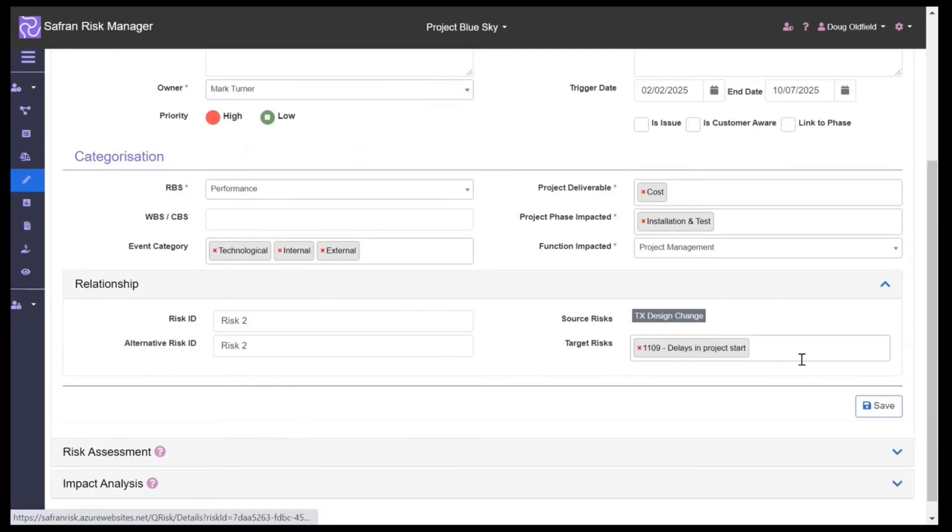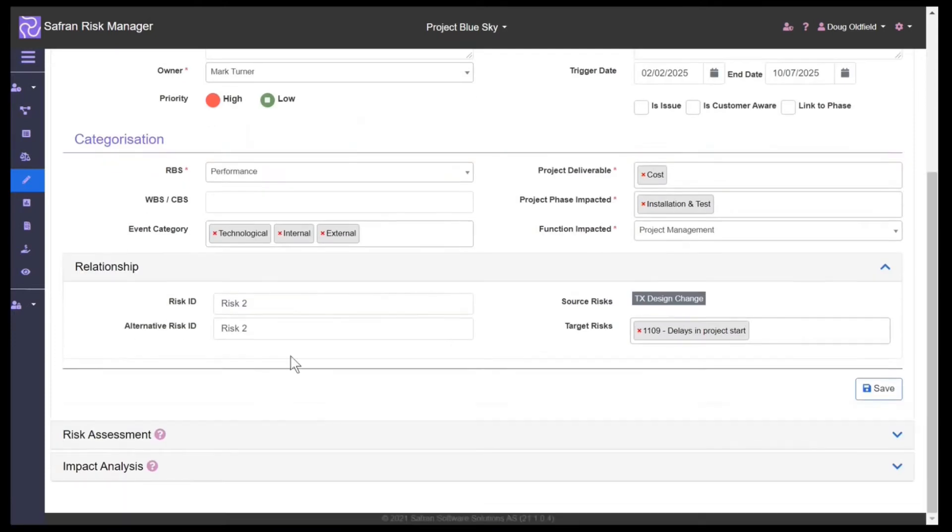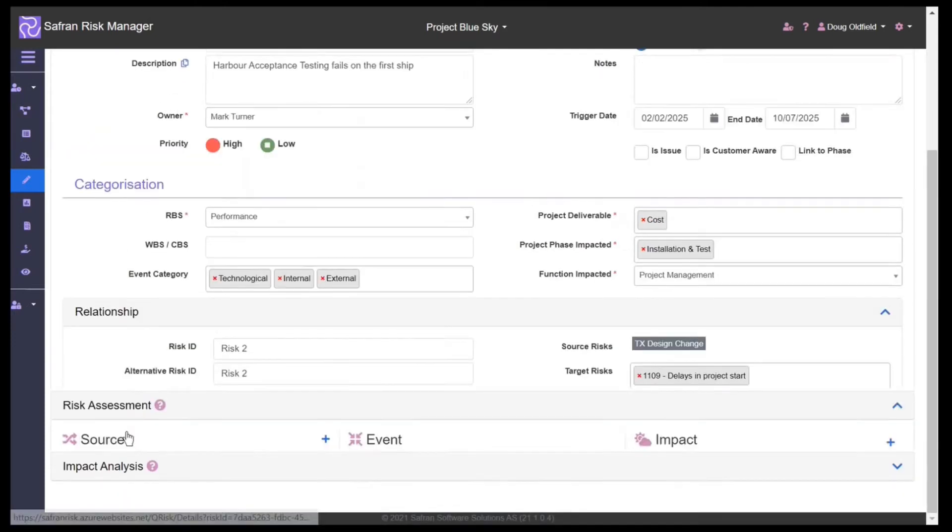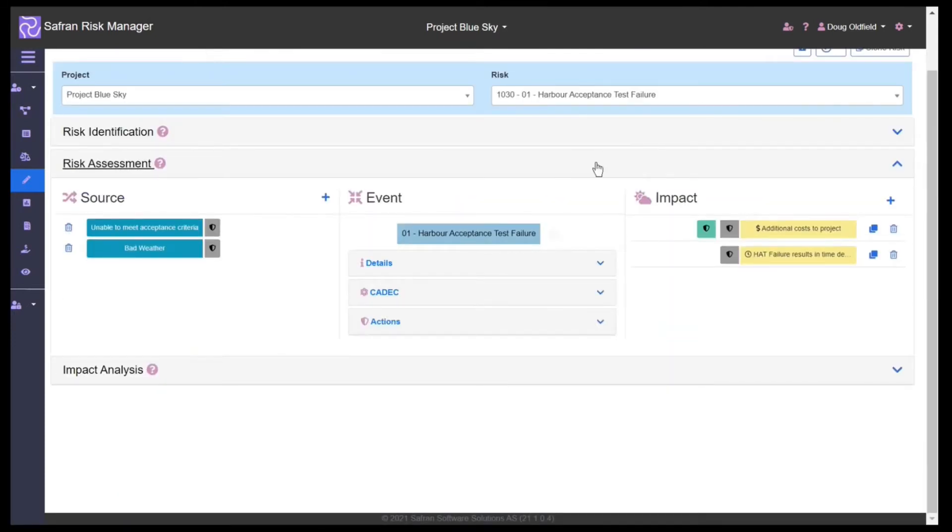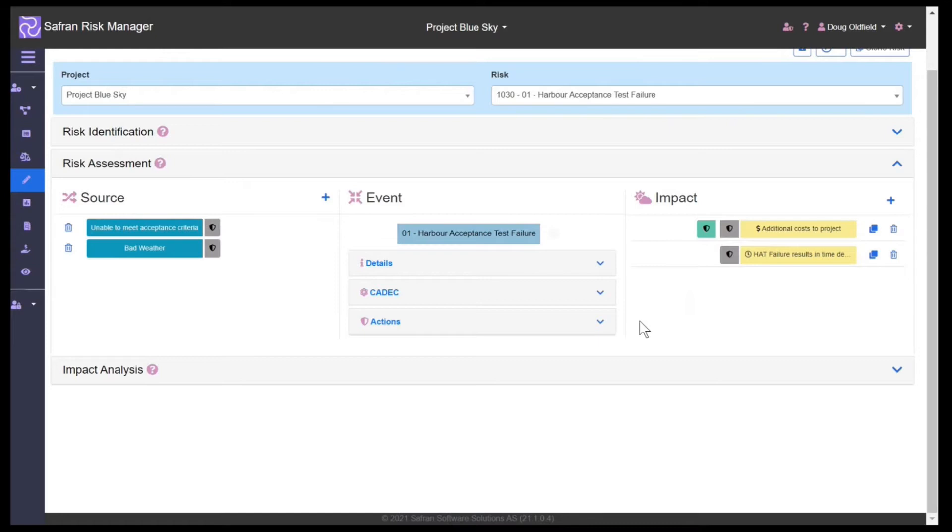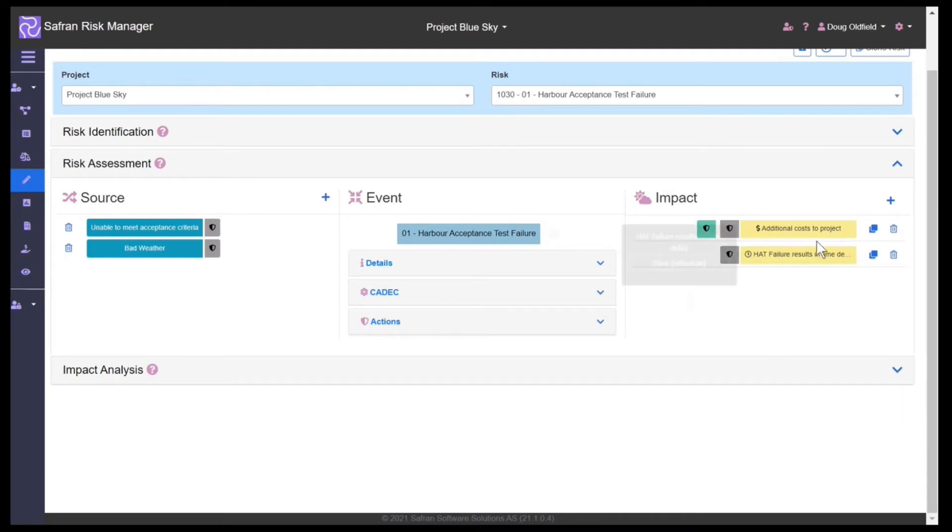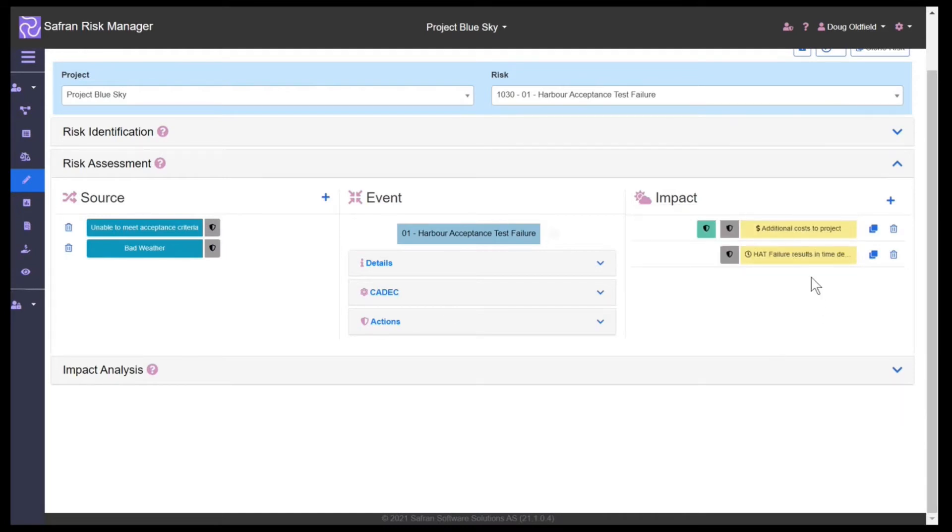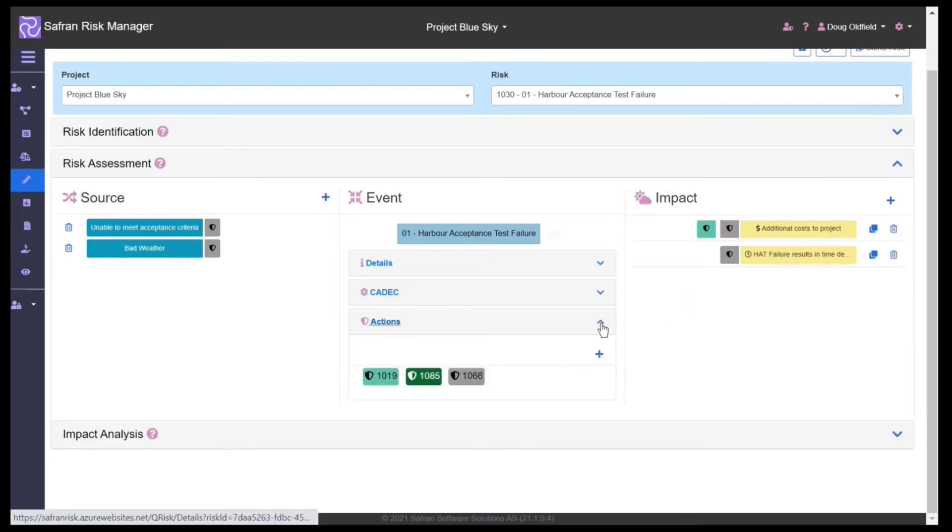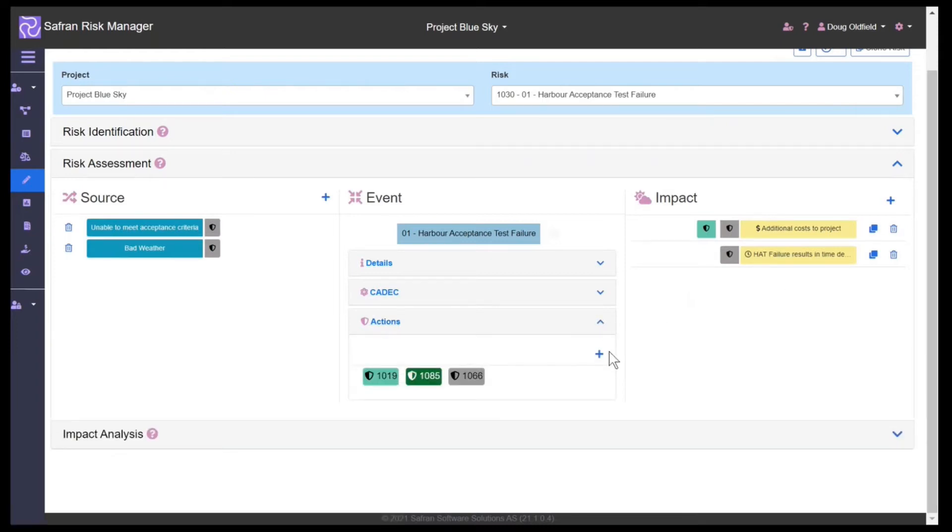Within the assessment area, we use the bow tie technique to give us a visual representation of the relationship between our risks. On the left-hand side are the different sources or causes. On the right-hand side we can see the different impacts if our actions, which are shown here in the middle, do not work as we would like them to.